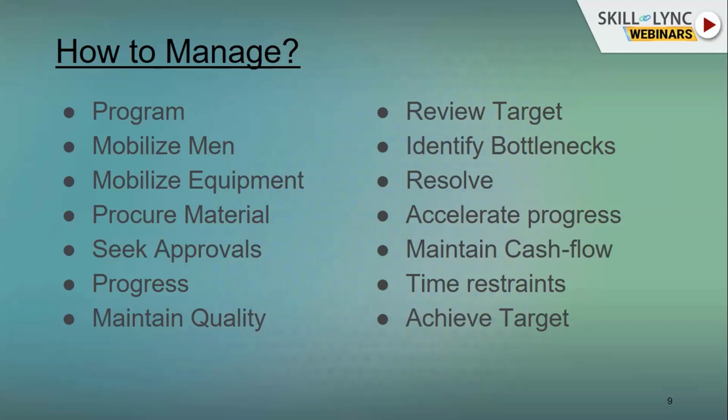For example, we will plan the foundation, starting from the scenario: whether that property is clear to start the work, whether it has any government issue, whether we have the CC to start the work, whether we have the proper manpower, the proper machineries, et cetera. Accordingly, he will make a program, manage the different materials to get to the site, and give proper progress.